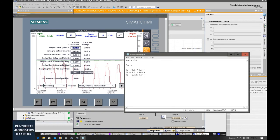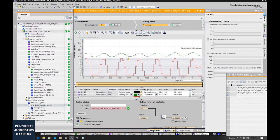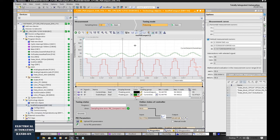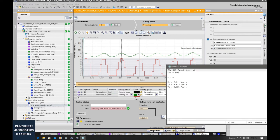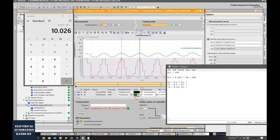Now let's go back and use this tool to measure the period between these two peaks. This delta time is 0.1671. We need to multiply by 60 because the unit of PCR is seconds. Calculating: that gives us 10 seconds.